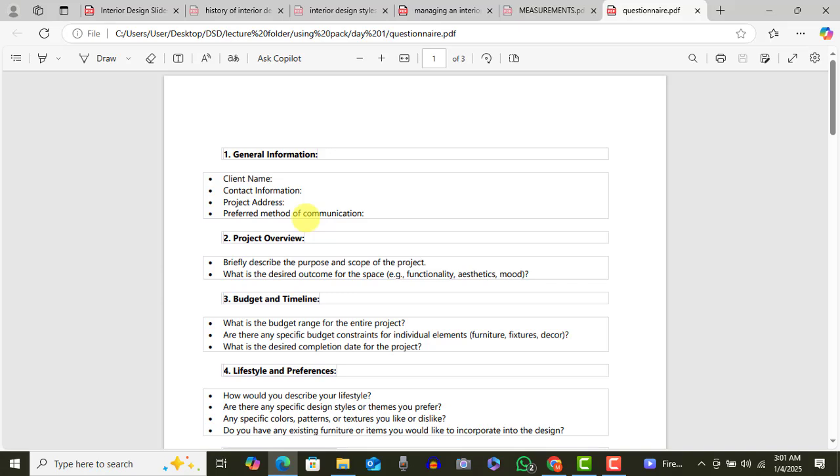Okay, it's a 3-bedroom house that I already built about 12 years ago. We are living in it, but I want to redesign it, give new life to it. So in this case, you know it's an old place. You just want to make it grow. So it's renovation among others. You get it? So they are defining the scope. It's a 6-bedroom house, but we are designing only the master bedroom and the guest room. So when they are adding a 3rd room, they are changing the scope.